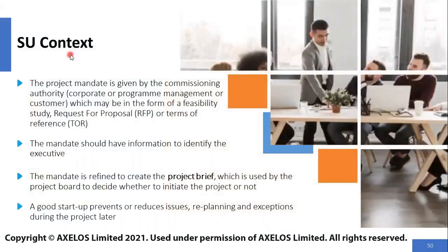We look at the context or the situation in which the starting up a project process works. The project mandate is given by the commissioning authority, such as the corporate program management or customer. This mandate or trigger may be in the form of a feasibility study, a concept proposal, a request for proposal, RFP, or a terms of reference or TOR.